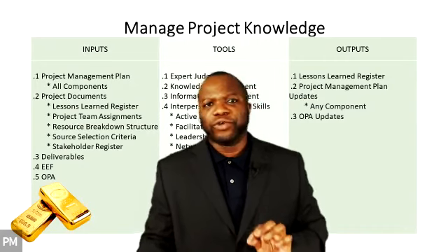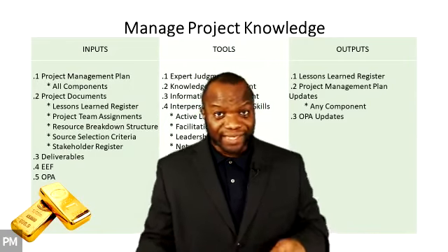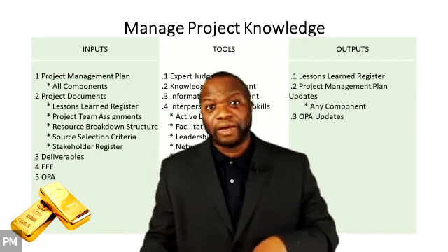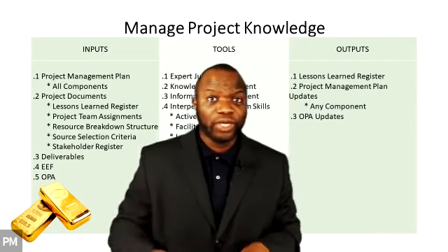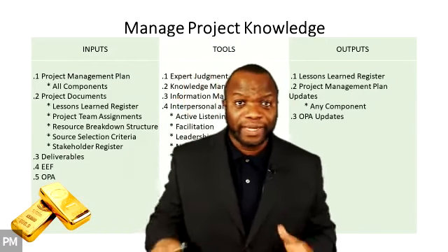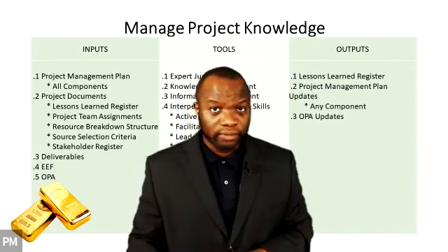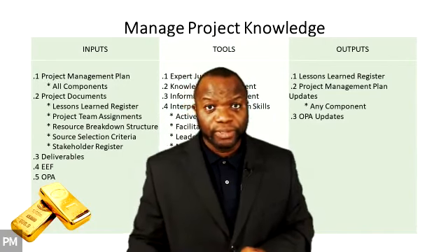So don't confuse lessons learned register with your OPA updates. Here, the updates are not your lessons learned. Here, the updates are the new found ways of doing things that you need to update in a process document, a standard operating procedural document somewhere. I hope that makes sense to you.